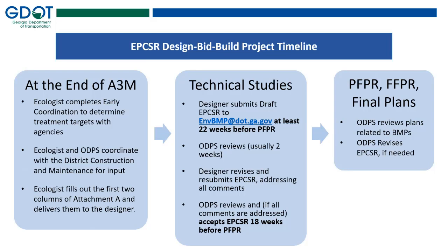And so because we identify resources prior to concept approval, ideally, that's when we have our greatest opportunity to consider avoidance and minimization. And also, if post-construction BMPs may be warranted, that's the best time to start considering them because we haven't made decisions yet about right-of-way and so on.